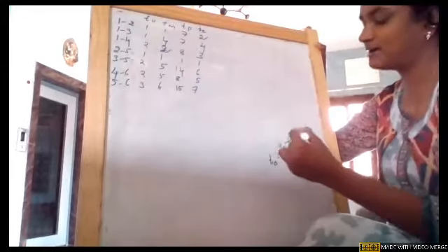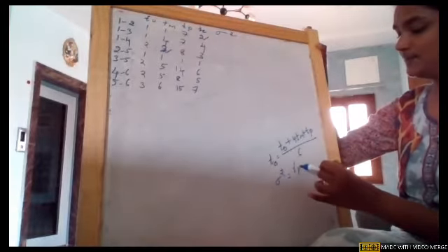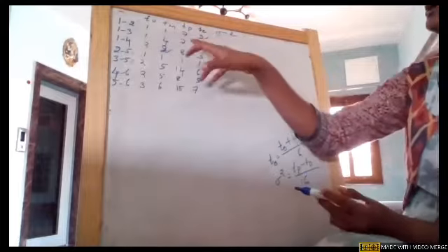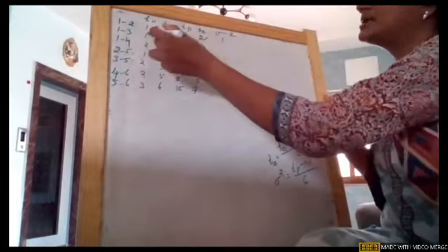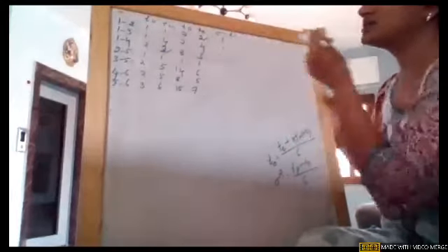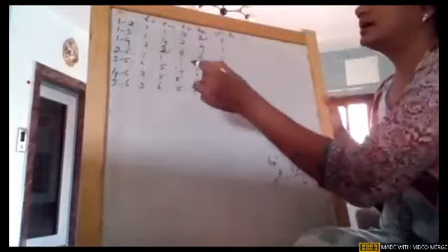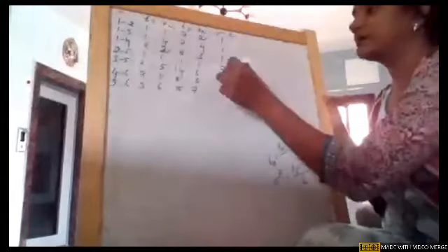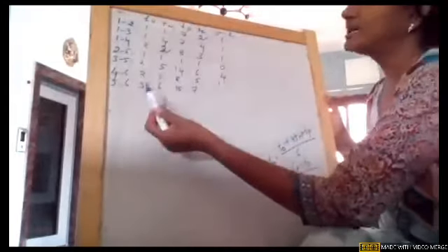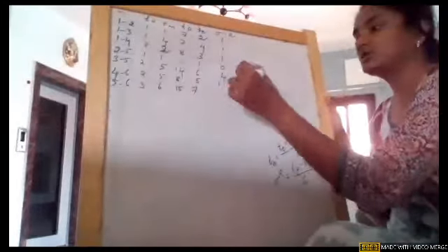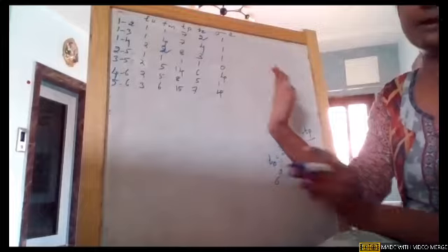After applying this formula, for variance, the formula for sigma square is TP minus TO divided by 6, squared. 7 minus 1 is 6, by 6 is 1, square 1. 7 minus 1, 6 by 6, again 1. 8 minus 2, 6 by 6, 1. And 1 minus 1, 0. And 14 minus 2, 12 by 6, which is 2, square 4. 8 minus 2, 1. And 15 minus 3, 12 by 6, which is 2, square 4. So this is how we got the estimated time and variance.